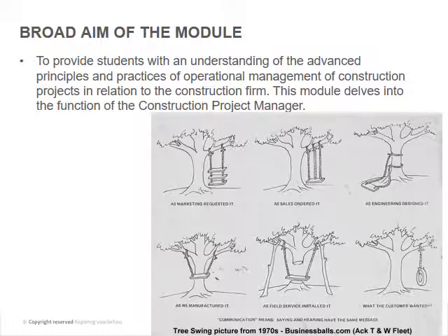So yeah, project administration, I cannot emphasize enough. It's simple things like a delivery note for drawings, having a date on there, letting the site agent sign for it. I always use this example.